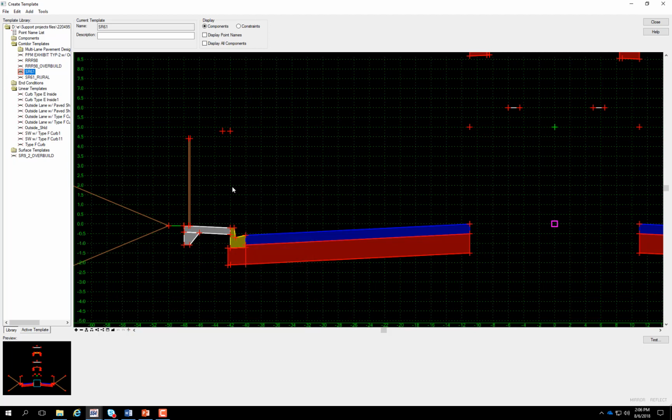And prior to the latest release of the CAD manual, that was going to be okay, because the contractors would utilize the finished grade surface and then just use that for essentially dialing down their earthwork to figure out on their machines what the depth needed to be in order to get to the finished grade for the sidewalk.